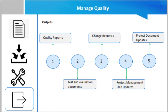Project management plan updates: sometimes rather than conforming the results to the plan, you may find that the plan was unrealistic, in which case you may need to modify the agreed-upon approach to managing quality based on actual results. This includes the scope baseline, schedule baseline, cost baseline, and specific quality management activities.